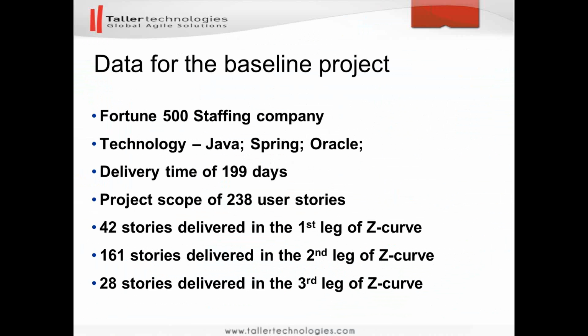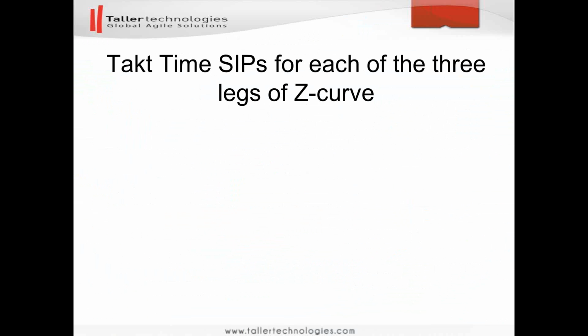the Z curve. During the first leg, the team delivered 42 work items. Over the second leg, the team delivered 161, and then over the third leg, the team delivered 21 user stories. So that's the data that I just showed in Excel, and now we are following the algorithm. So again, what we are trying first